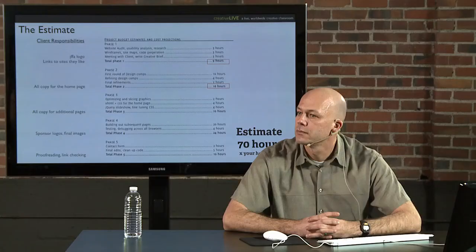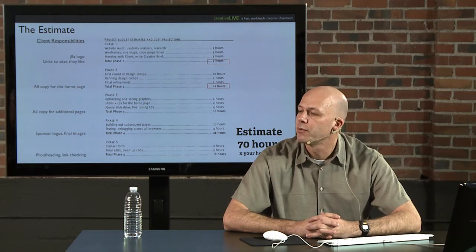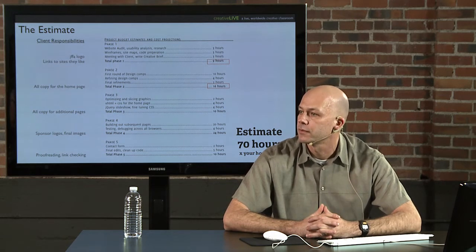Yeah, a couple questions from the internet, Eric, thanks. Did you make the wireframes and sitemaps before signing the contract? This is from Joe Trees. No. In a sense, I would sign the contract first, and then I would start building the wireframes. That would be part of my billable hours. Thank you. And a request to show the wireframe again, please. Absolutely. Let's just go back.